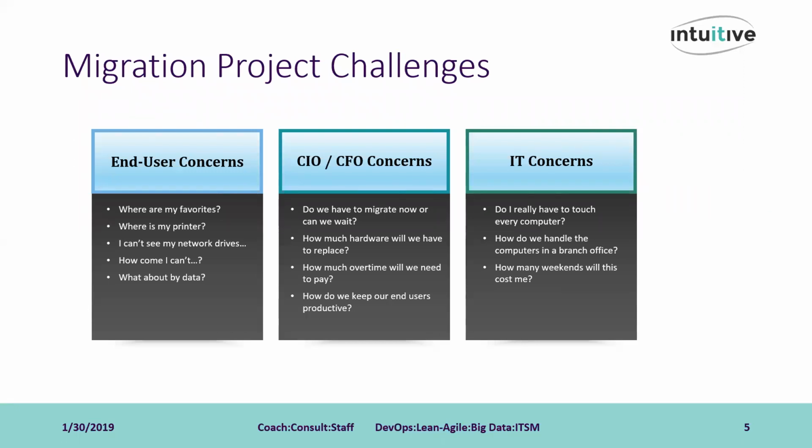In the middle here, we have the next stakeholder group, and arguably the most important, the project sponsor. So your C-level executives will need a very different set of information than the end users. We typically make sure that we're prepared not only with the technical implementation plan, but a financial breakdown of costs aligned with a schedule of the implementation timeline, taking into account various business-specific constraints which may affect the implementation plan, and accurate time estimates of how long each computer being migrated will be out of service or unusable.